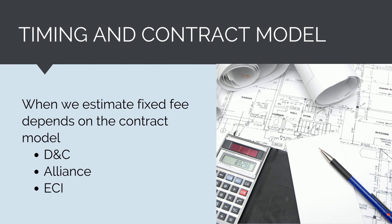When we estimate this fixed fee will depend on the contract model used by the client. On a typical design and construct contract, we'll estimate this fixed fee during the tender stage. On an alliance contract, we'll work with the client to determine this fixed fee after contract award. And on an early contractor involvement contract, we'll do this after we've already worked with the client for an extended period of time. Basically, in all these situations we'll still eventually estimate a fixed fee — the contract model will determine when.